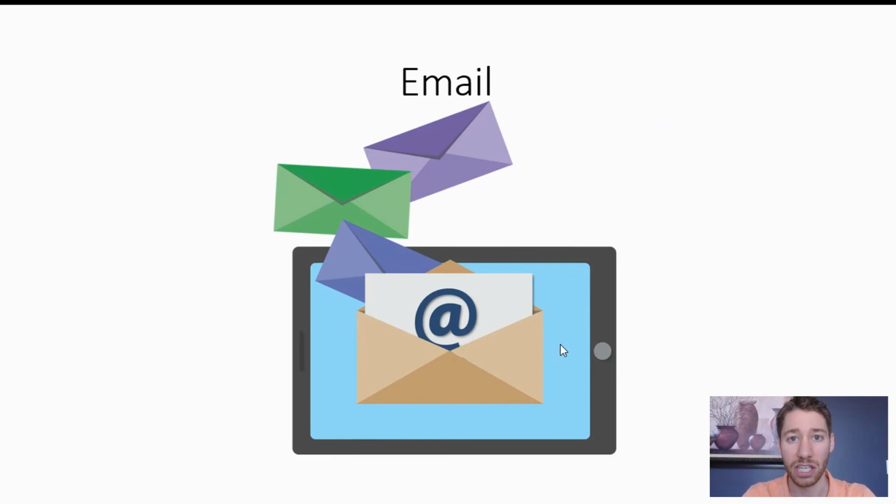I typically leverage email as a project manager to follow up on phone conversations or other discussions that we've had in order to make sure that it's captured. But I try to limit those, right? If it's something I can put in the status report and then email it, that's what I'll do. I'll hit the highlights in the email, like, hey, here's the top 3 things you need to know out of that status report I've attached. If you want more of the details, open that up and take a look at it. That's fine. But relying solely on email is a mistake.